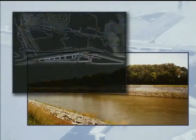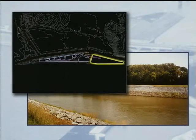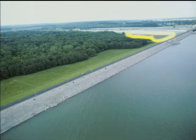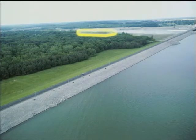The lower East Bank tailwater bench area has been configured for bridge construction access, access for the downstream landward approach wall, cofferdam fabrication and related marine activities, and land transfer of dredged materials. Staging and laydown for both the highway and bridge work are generally limited to the West Bank area. This minimizes impacts to the already congested East Bank areas.